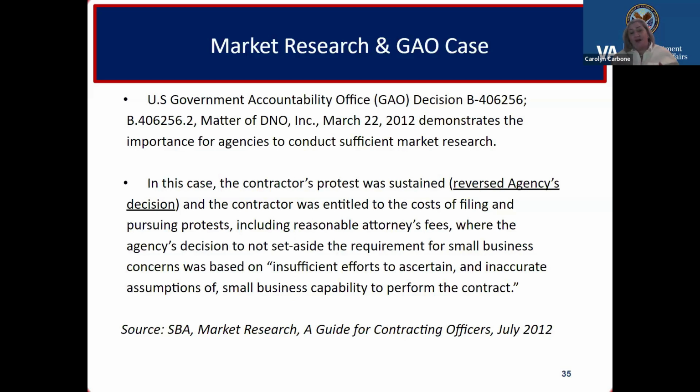We weren't protested or anything when we solicited. However, we did end up having to cancel the solicitation and pull it back. And now we're working to re-solicit it after additional market research has been done. So it just goes to show you how important it is, because if it's not done properly, it can really eat up a lot of valuable time. And I know market research takes time, but it's worth taking the time to do it when you have the time versus when you do not.